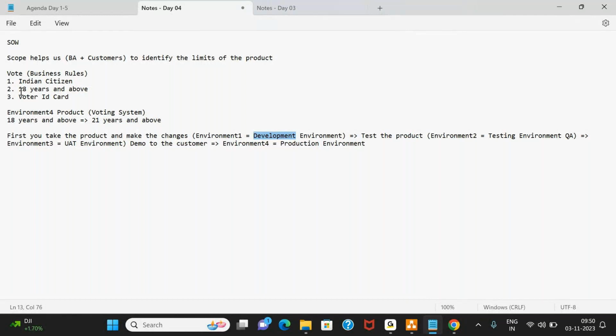So if I give you Aadhaar with wrong details, how does the system behave? If I give you Aadhaar with right details, how is the system behaving? Like that, you create different scenarios that you are going to test. In the test plan, you list out what environment you are going to use, when you are going to start testing, what the different scenarios are that will be tested, and then accordingly test and communicate, keeping everyone updated about the progress of your testing.